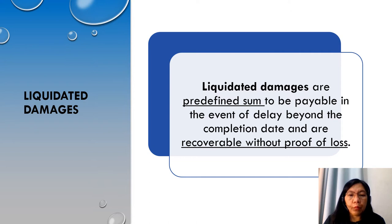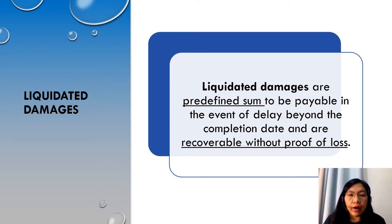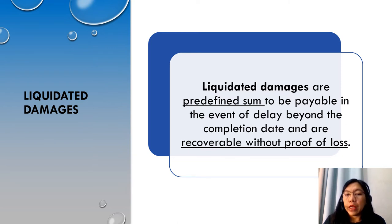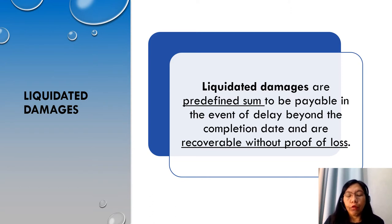Liquidated damages are predefined sums which are payable in the event of delay beyond the completion date, and are recoverable without the need for proof of loss. Liquidated damages are an amount of money agreed upon by the parties at the time of contract signing. The agreed amount usually establishes the damages that can be recovered in the event a party breaches the contract, and this amount is supposed to reflect the best estimate of future damages at the time of contract signing.